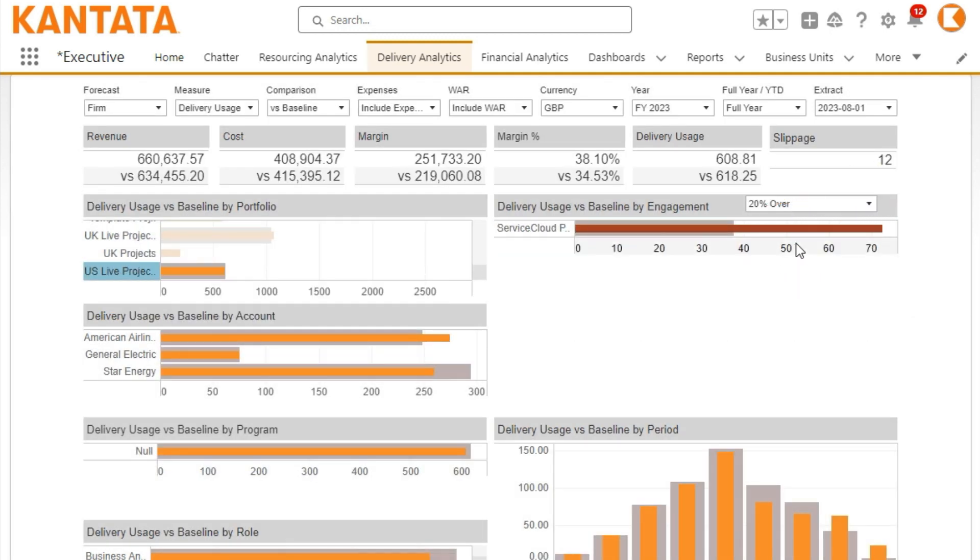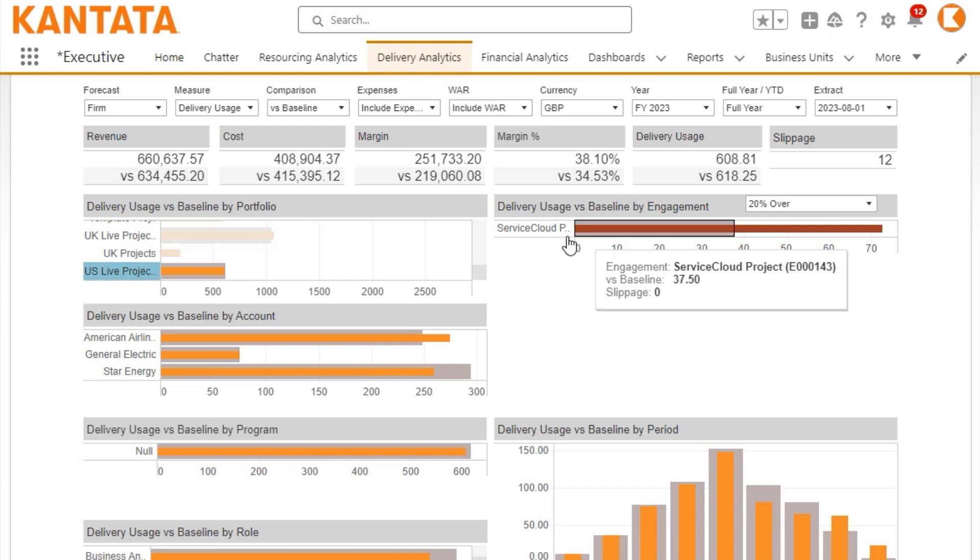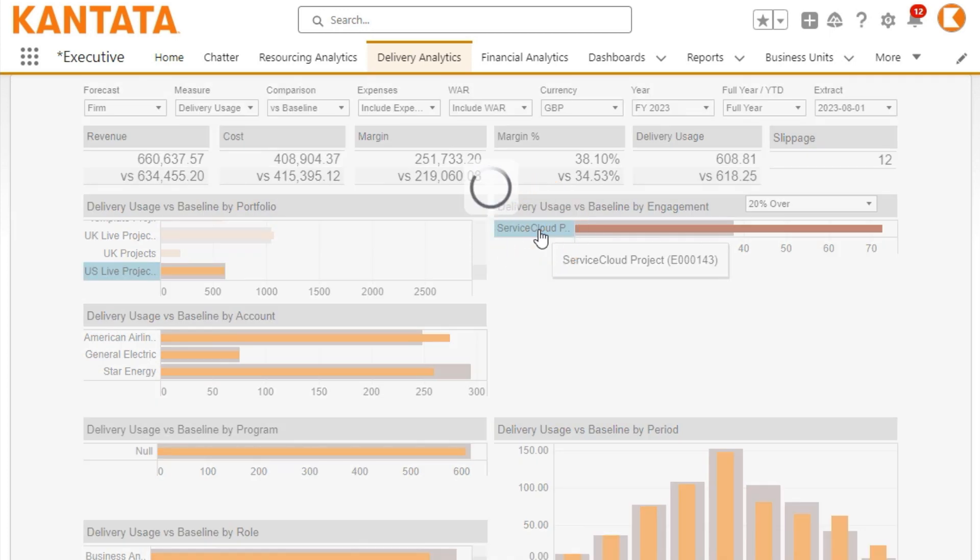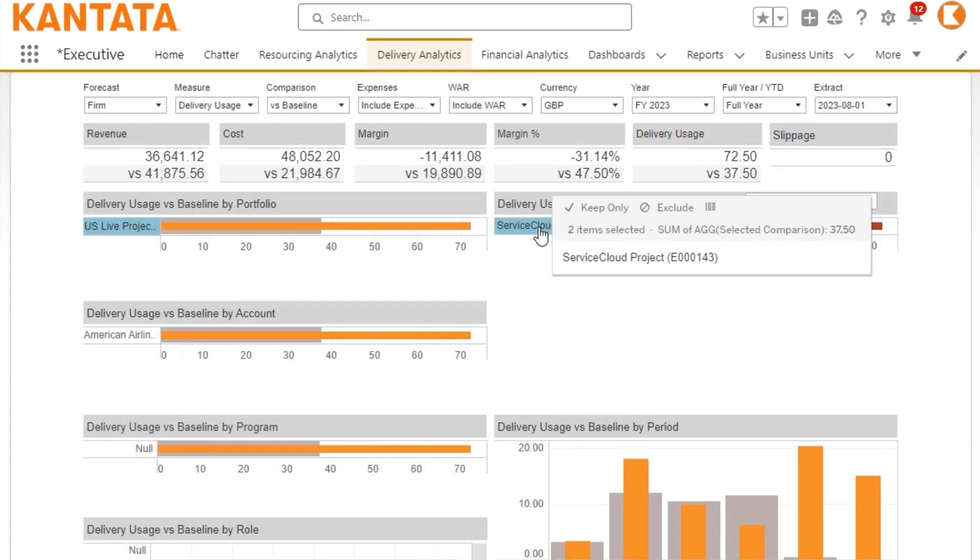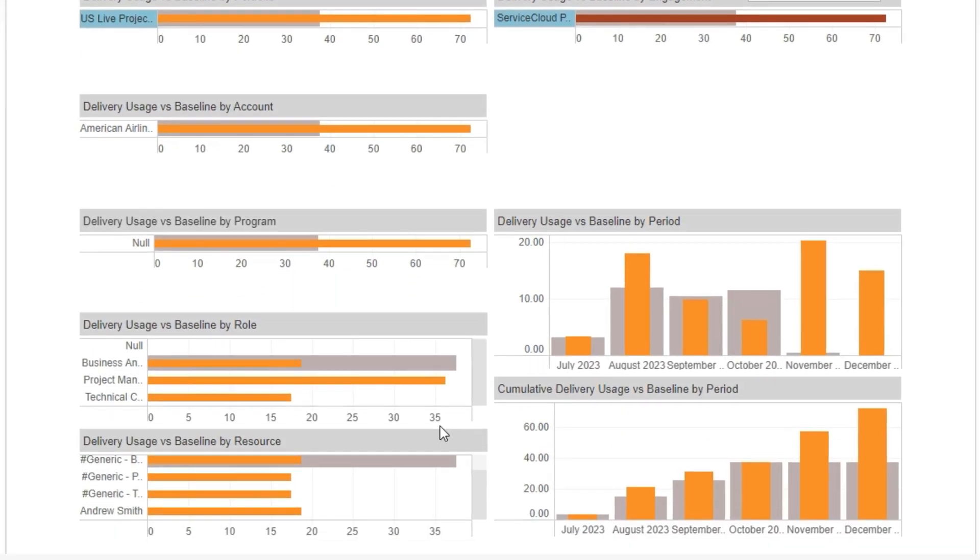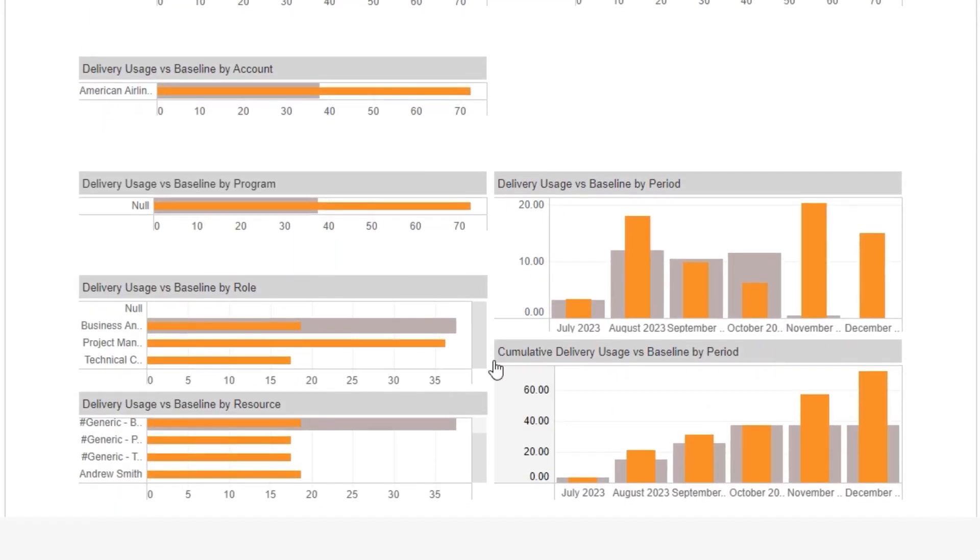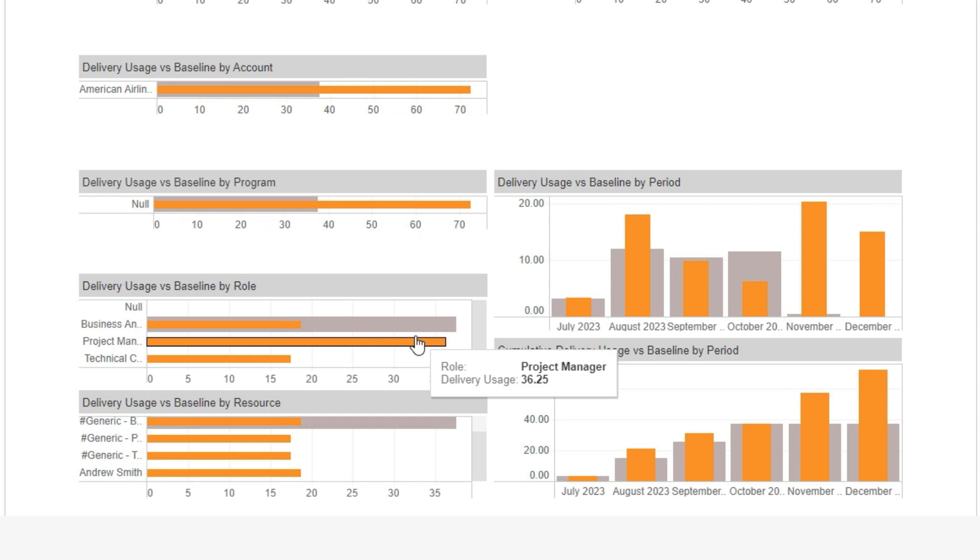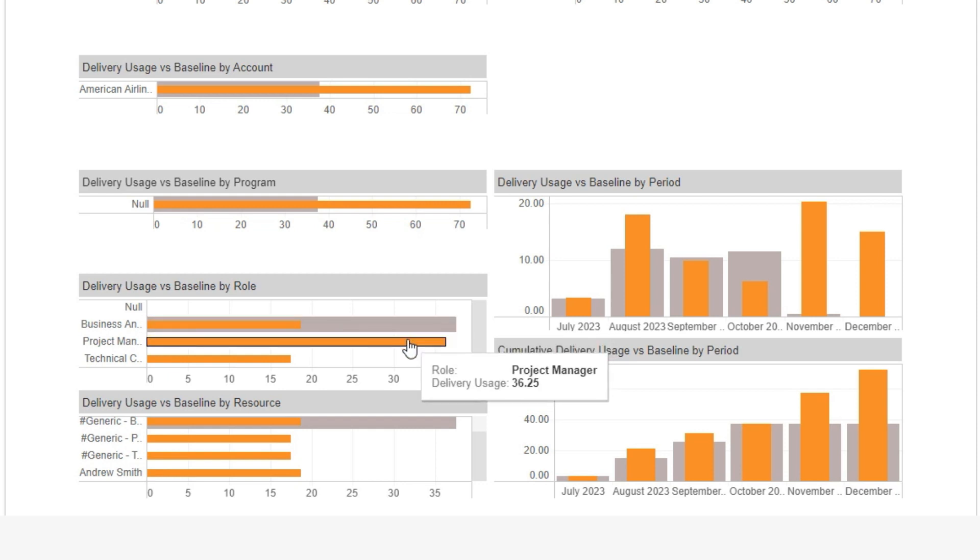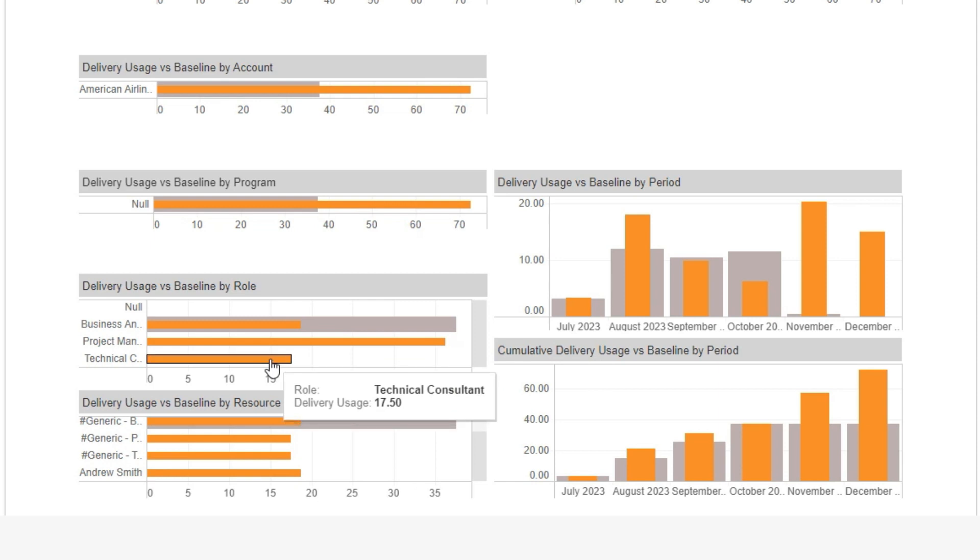There's one project which is more than 20% over budget, so you can drill into the detailed resourcing forecast. Looking at the breakdown by role, it seems that this project was originally just for business analysis, but now there's a project manager and technical consultant involved as well.